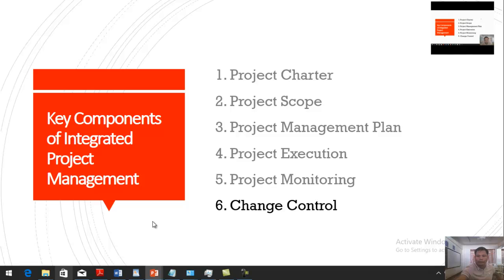5. Project monitoring. In the execution stage, you measure the performance of the project. However, this performance doesn't exist in isolation, you need to measure it against an established baseline. The baseline is defined in the initial project plan. This is the prime aim of project monitoring. In this phase, you compare the project performance against your baseline on an ongoing basis. If there is a severe negative deviation from the baseline, the acceptable deviation is, again, defined in the project plan, you can modify the project accordingly.